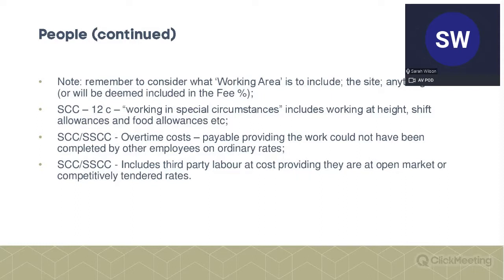Some people like to put their head office as a working area, so that basically anybody who's working in the head office on the project can claim their costs as people. Otherwise, as it says, it's deemed to have been included in the fee percentage. Now, if your office is covered as the working area, I suspect your fee percentage would need to be substantially less than it would normally be. Otherwise, if it's a tendered situation, you're not going to be particularly competitive.